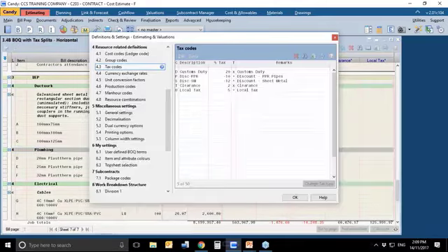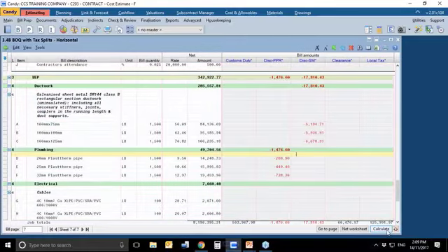You could go to the blue hammer, you could use it as your control sheet, and here say, okay, instead of that 12% discount for the sheet metal, if I go and change this to be 15%, click on OK. Let's click on calculate. You would notice that 14,000 is now changed to 15,000 now, 17,000 now. So it's a dynamic document. Any changes that you would make on your definitions, tax code definition, any changes to your tax code factors would impact on the bills. It's quick. It's a boon for the MEP guys.